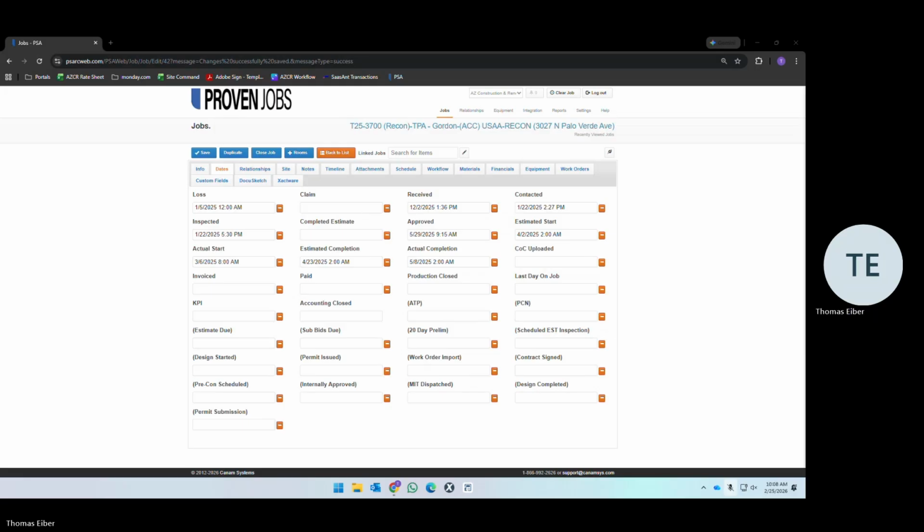95% of your PCN submissions should have no additional visits. That means if you communicate with a PM and they tell you that it's done, you need to be auditing the information they're giving you to make sure that you have the photos, that they've done the work correctly, that they've done it based on the scope, and what you have access to. When you submit a PCN, if we have to go out and warranty work or do an additional visit, that is marked against you. So 95%. Every 20 jobs you close, you are allowed one site visit where we are going back and working on something after a job is supposed to be closed.